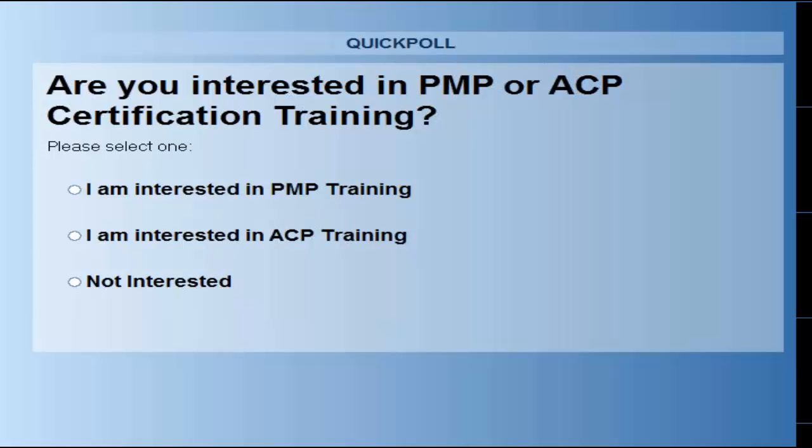I asked 5 questions. What is the problem that is trying to be solved? Why does it need to be solved? What are the critical success factors? What is the solution? And what's the payback period? When you look at a bare bones portfolio management system stripped down, those are the questions trying to be answered. And so, in those lessons learned sessions, there may be 5 questions that you may start with.